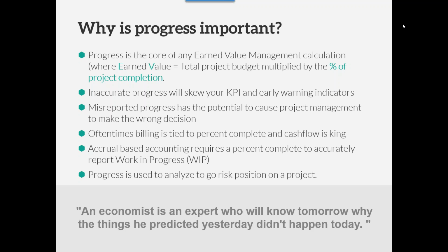So, putting on my operations hat, if we have large sums of money that will never be spent on a project that's sitting in a contingency account, and the risk profile is being determined based on a to-go scope of work, that really comes back to the core percent complete calculation on where do we really believe we are. If there's a large amount of work or scope that isn't accounted for, then that progress calculation has the potential to be skewed. And again, coming back to the second bullet and the third bullet, management both on project and off project may be making decisions that necessarily have the ability to negatively impact both the project and potentially even the corporation.